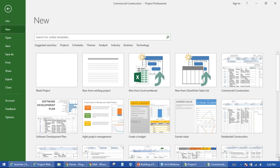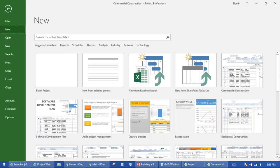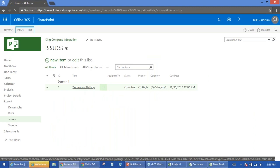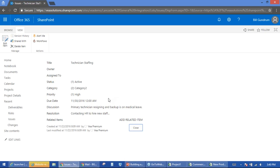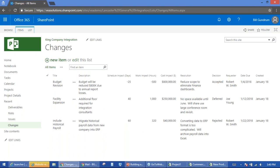Clicking on Issues — it's the same basic approach. A risk is something we're planning for early in the project, identifying things that could go wrong. An issue is either a risk that has materialized or something unplanned that needs an action plan, escalation to management, and resolution. For changes, this doesn't come built-in but these are just SharePoint lists — it was easy to add tracking for changes and keep a log of all schedule, scope, and cost changes, in the same fashion as risks and issues.